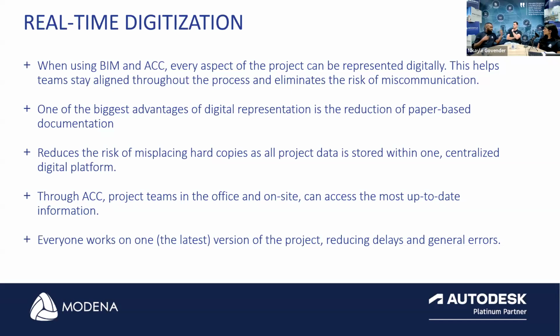I come through on site and take a picture of, let's say, the air conditioning unit, whether it's not working properly, or a wrong window, or whatever that is. I create an issue and assign it to you, and immediately once I'm done, you get a notification in real time that so-and-so needs to get fixed on site. And even to close out that issue, your contractor is able to go on site, take a picture themselves and say, hey, look, I fixed it. So you're not having to walk through sites again to check that everything's fixed.